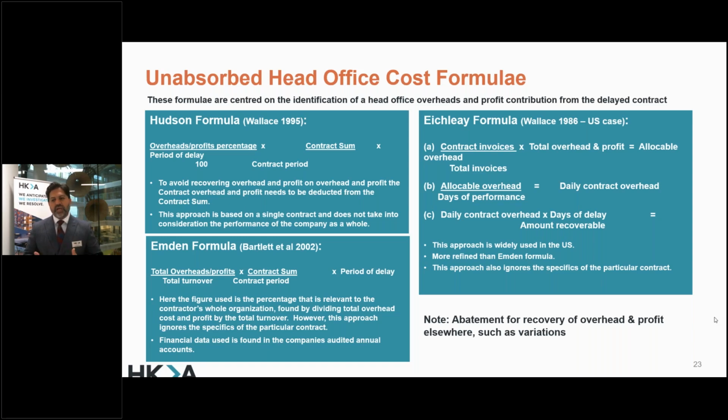Now, while the use of formulas has been heavily criticized by many commentators, there is existing judicial authority, specifically in the UK, for their use in certain instances. So whatever formula you are using, just remember that it's just there as a means of assessing your quantum. The fact that there was an actual loss, and that this loss flows directly from the relevant event for the compensable delay, must be identified first.